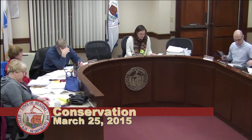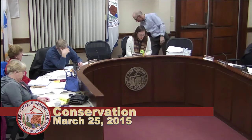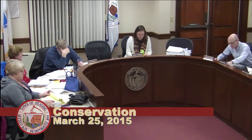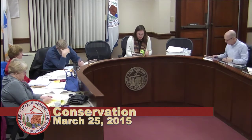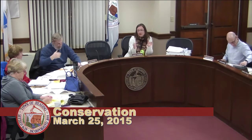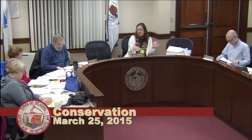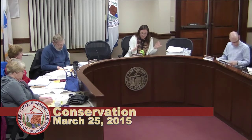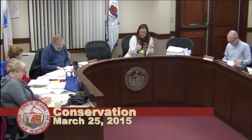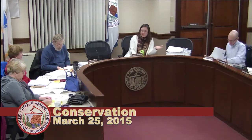But I got advised that we need to stay in the know about this. We need to file with FERC for an intervention and do an ecological evaluation to assess the value of the land they're going to disturb, to try and get mitigation on the property based on the proposed impacts. So I don't know how to get us into FERC as a vested party for that intervention and to get in for mitigation.